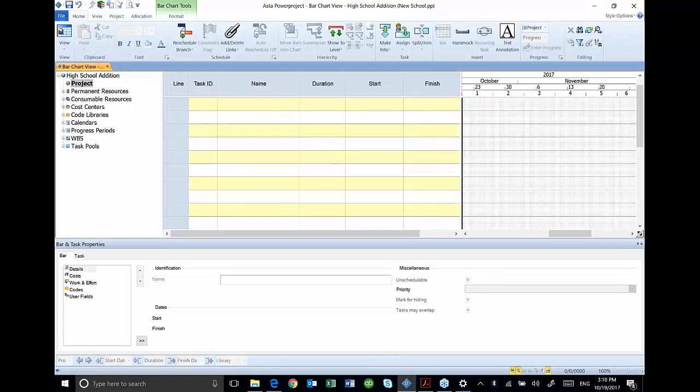The first thing I do, on page 15 in your manual if you downloaded that, I've got a little diagram there, really just to illustrate the importance of doing things in a sequence. I always recommend that the first thing you do when you create a schedule is to go in and set up the calendar so that you have a good foundation. The calendars are what the software uses to calculate days and assign dates to certain activities. And so the calendar can be a very helpful thing. A good calendar can really help, or it can really make things difficult.